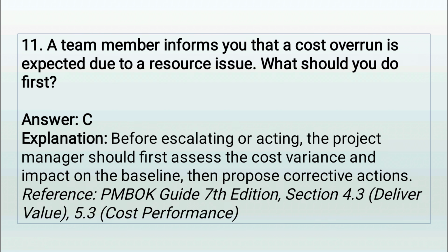The correct answer is C. Evaluate the impact and update the cost baseline. Let's talk about this. When you're managing a project and someone raises a red flag, like an upcoming cost overrun, your instinct might be to run straight to the sponsor or make a fast change. But as a certified project manager, you're expected to lead calmly and strategically. Your first step is always to assess the impact.